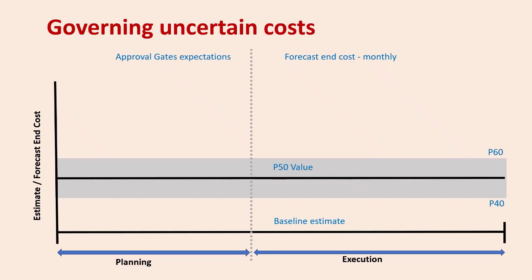A far more realistic value for the project is the P50 amount. This is the expected cost. The final result will generally be within a bandwidth of, say, P40 to P60, so P50 is the number we should keep referring to. Setting realistic expectations now will save considerable stress later.